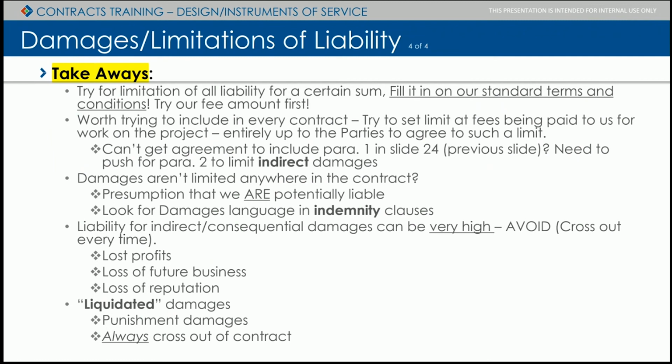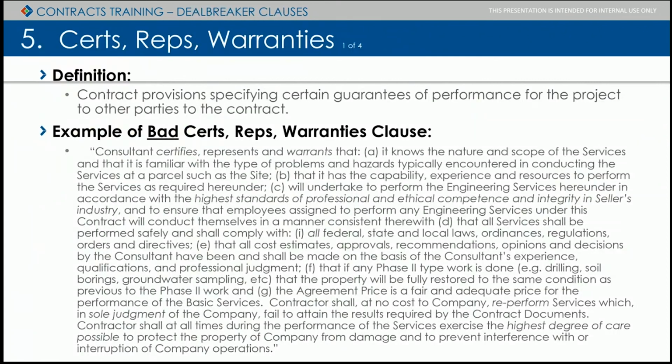them against you. But it increases the risk for all parties involved, and it's not an insurable risk, and therefore it just increases costs across the board. That's the bottom line. All right, last one. This one also is relatively straightforward. Certs, reps, and warranties.